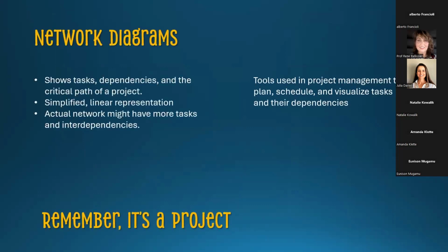All right. The last part of my presentation will talk to network diagrams, and then we will be discussing that and apply that before we finish, hopefully by 4. So a network diagram takes all these tasks that we've been talking about, all these possible dependencies, and what I've already said, develop a critical path in a visual representation. So it shows you what it looks like to take the tasks, to present them in a line, to check which of these tasks are dependent on one before and which can take place consecutively. And then work out a plan where you can see it.